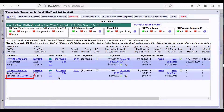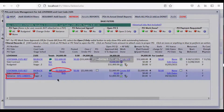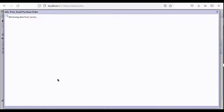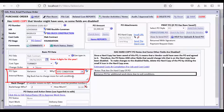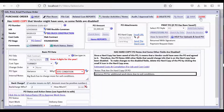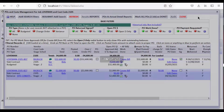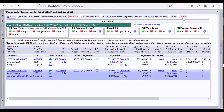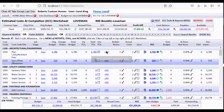There's also a variance PO for site conditions. If you open the full PO, it says Big Buck has to charge more for soil conditions, and they selected a variance reason. What's really cool about variance POs is that you can set up whatever variance reasons you want, select them, and then run reports of variance POs to see what caused you to go over or under in various places. It's very handy information. POs are a super powerful communication tool.